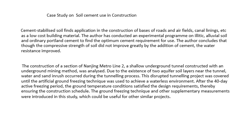The construction of a section of Nanjing Metro Line, a shallow underground tunnel constructed with an underground mining method, was analyzed. Due to the existence of two aquifer soil layers near the tunnel, water and sand inrush occurred during the tunneling process. This disrupted tunneling project was stalled until the artificial ground freezing technique was used to achieve a waterless environment. After the 40-day active freezing period, the ground temperature conditions satisfied the design requirements, thereby ensuring the construction schedule. The ground freezing technique and other supplementary measurements were introduced in this study, which could be useful for other similar projects.